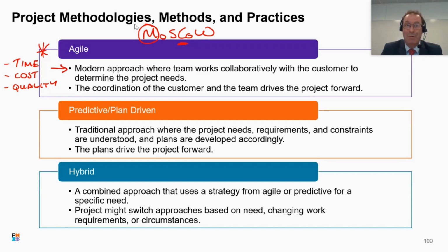Once we've cut out all the could-haves and we release that resource back into the project environment, we can then start chopping away, if need be, at the should-haves. But remember, the must-haves are sacrosanct. We cannot drop any of the must-haves because that's the minimum usable subset. That's what the customer is expecting as the absolute minimum. Trust me, you start dropping the should-haves, they'll get upset. But remember, we can still deliver an Agile project output without delivering the should-haves.